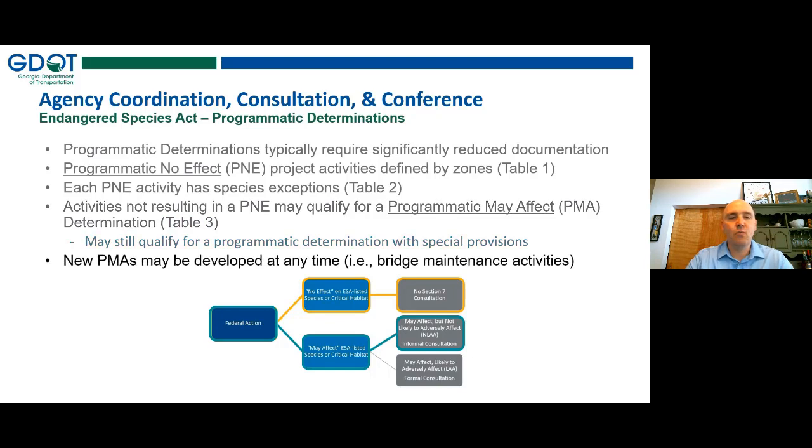As I mentioned, we have the opportunity to develop more of these programmatic assessments, AOEs, at any time. Of course, they take time, and so we can't just do them for everything right away, but we have plans to do ones for bridge maintenance activities. And we will continue to expand that, hopefully with an aquatic programmatic to follow. And it gives us the opportunity not only to do informal Section 7, but also potentially do formal Section 7 programmatically, which would be a huge time savings on projects and no longer be a project killer if you've got formal Section 7.